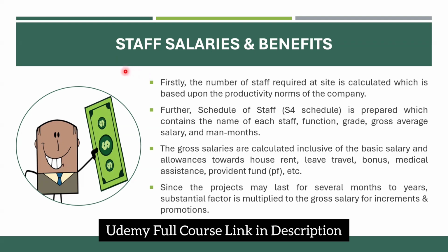As I already discussed, your staff is not separately contributing to any specific activity like concreting or shuttering or reinforcement. So that is why their cost you cannot contribute to the direct cost. So they will be coming under the umbrella of indirect cost.